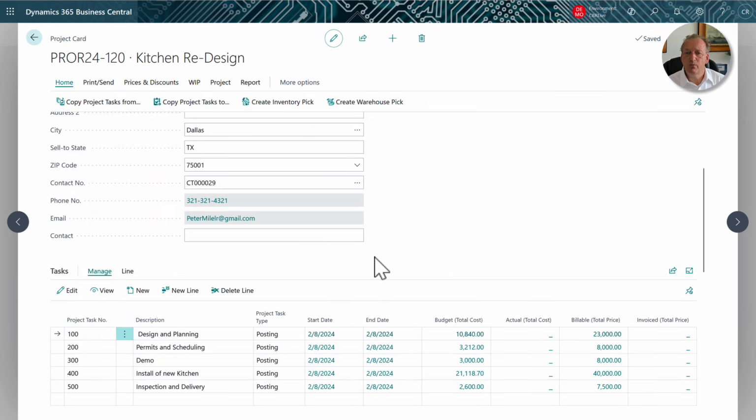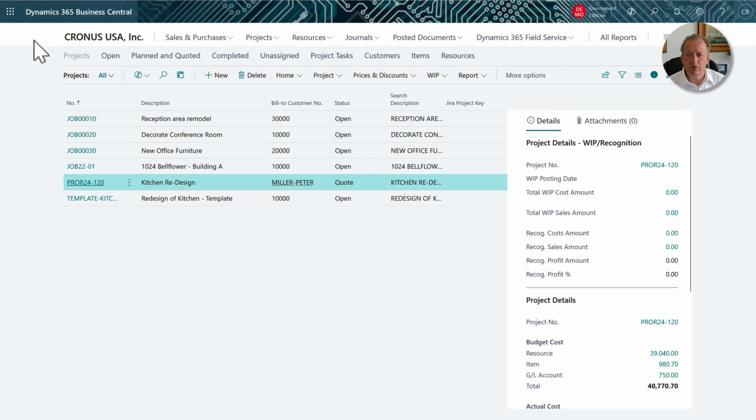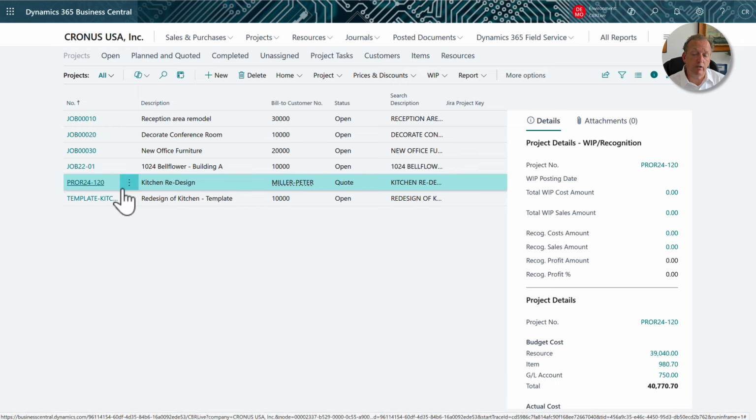So, as I showed you a moment ago, this software will generate purchase orders for you directly against a specific project. However, if you aggregate projects and you have common materials, maybe in the roofing industry or other industries where you use the same sort of raw materials for multiple different projects, you might want to consolidate your purchases for multiple projects as part of the item inventory setup.